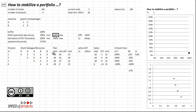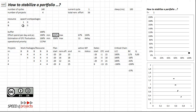If you want to spend more than 50% more, you can increase this number to 200. I'll explain why not 50 plus. The scheduler uses this as borders and chooses randomly something in between. So if you choose here 100 and 200 percent, in the mean it's nothing else than 150, and that's nothing else than one additional person.